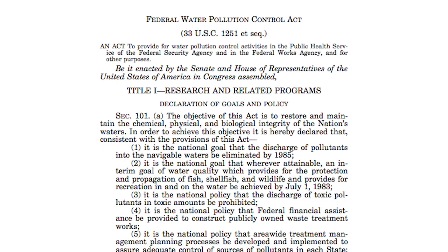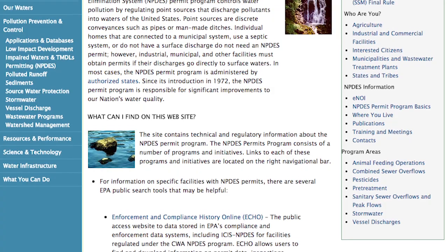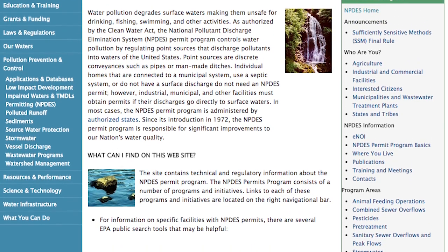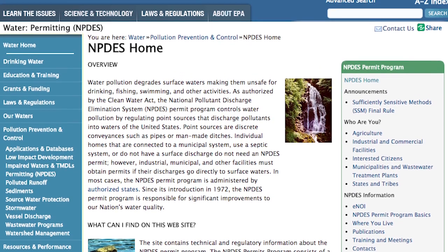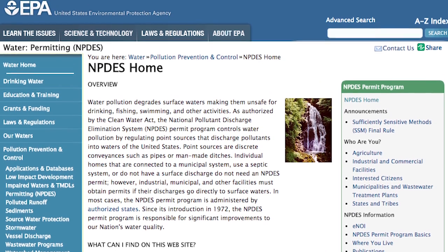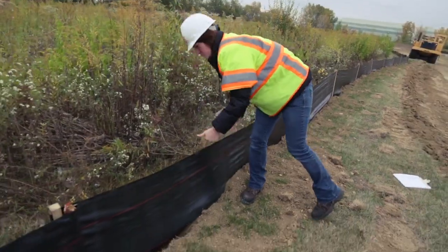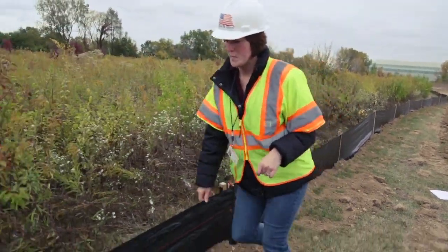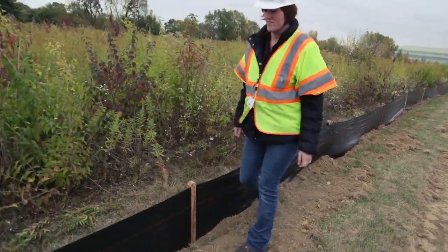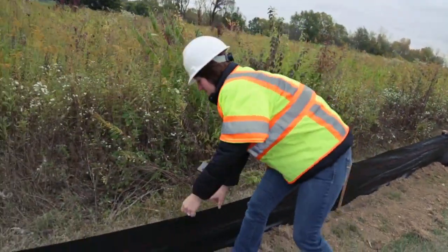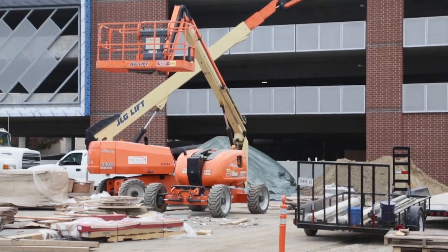These laws, required by the Clean Air and Water Act, National Pollutant Discharge Elimination System or NPDES permitting program, vary and are implemented at the local, state, and federal level. Inspectors must look for adequate erosion and sediment control, waste management, and stormwater quantity runoff management as they apply to each site. Please keep in mind that no two sites are alike.